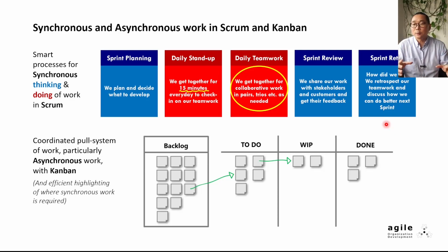And the genius here is to make these sync events happen at regular timings and in a time-boxed way. Putting discipline here is a management technique. And then during red time, that is doing work time, the design of Scrum is to give as much liberty to the team on when to work synchronously and asynchronously. The only synchronous working requirement in day-to-day work here is the 15-minute daily stand-up. Other than that, it's up to the team for who, when, how to do synchronous work.